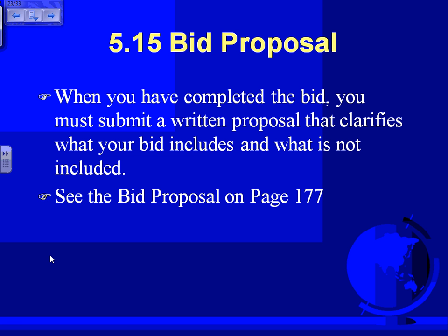Look at this one, payment not received. If you don't pay me within 30 days, I'm going to penalize you too, because I'm going to go borrow money from the bank to pay, right? So if you guys read through it, it says 1.5% per month. I'm going to penalize you, charges, if you don't pay me within 30 days of the payment.